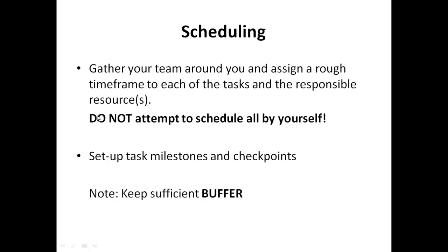Continuing with scheduling, once we've done the work breakdown structure and identified our critical tasks, we then gather our team around for an assessment on the WBS. It's not like if you created a work breakdown structure, it's going to be the absolute defining thing for your product, for your project. You never do things by yourself. Gather your team around you, assign a rough time frame to each of the tasks in consultation with them and the responsible resources. More than telling them, it should be getting it from them how they're going to do things. So we do not attempt to schedule all by ourselves. We need to involve the whole team and then create the schedule, and then set up the task milestones and checkpoints.